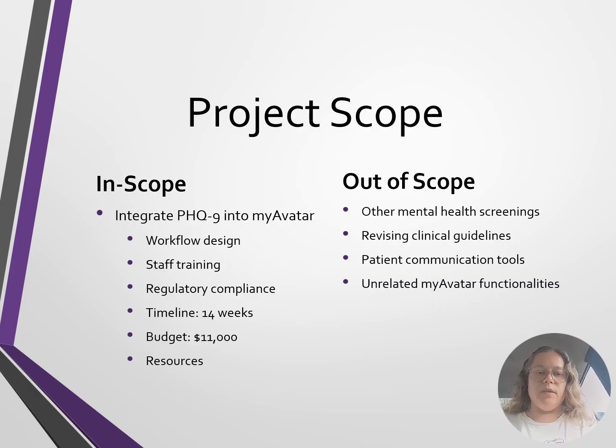The software customization is $8,000, staff training $3,000, and maintenance and support $1,000 annually. Resources include IT professionals for My Avatar integration, a clinical staff training specialist, and a project manager to oversee the implementation.